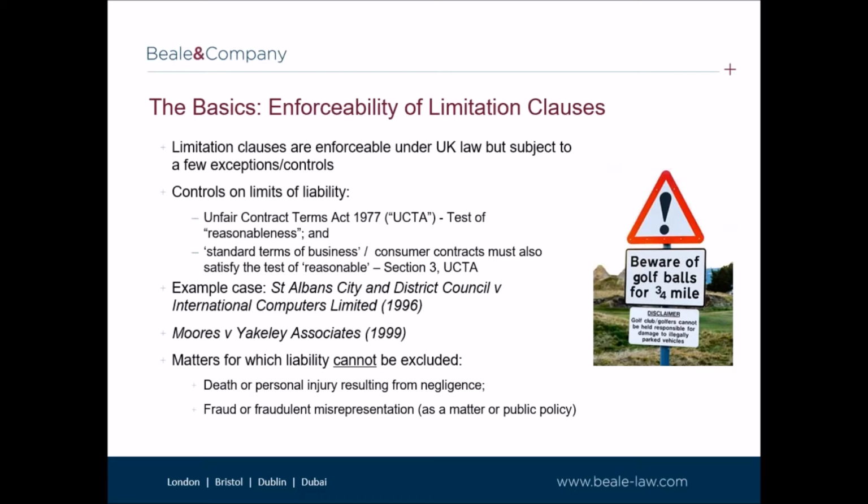The Unfair Contract Terms Act 1977, or UCTA, requires that any clause which is in a supplier's standard terms or attempts to limit or exclude liability for negligence must satisfy the test of reasonableness. If it is not reasonable, the term is unenforceable. This applies to almost all limitation and exclusion clauses.